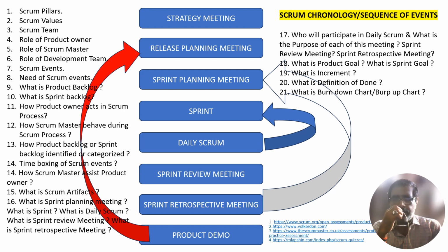If the product owner or the Scrum Master are actively working as a part of the development in the sprint backlog, then they also participate in the daily Scrum, but it is not mandatory for them to join. The developers can select whatever structure and techniques they want as long as the daily Scrum focuses on progress towards the sprint goal and produces an actionable plan for the next day of work. This creates focus and improves self-management.